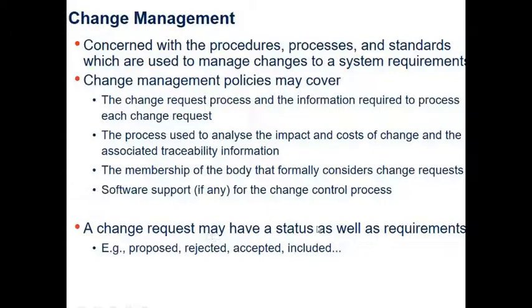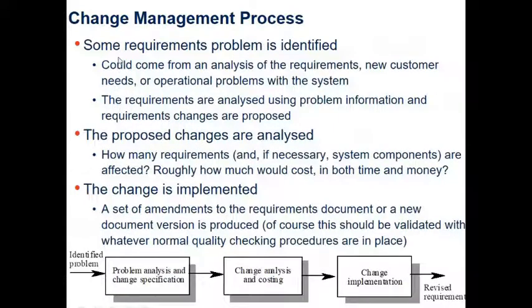A change request may have a status, just as requirements do. For example, the status of a change request could be proposed, rejected, accepted, or included. Those are the statuses of a change request.